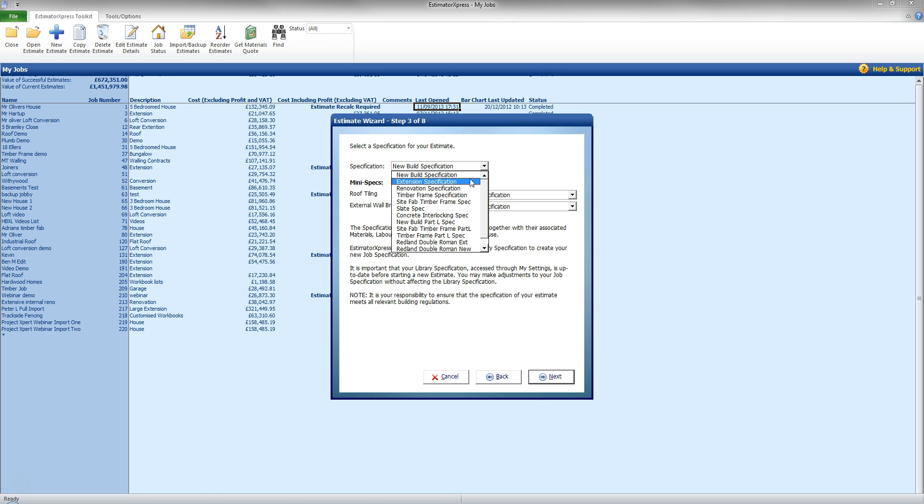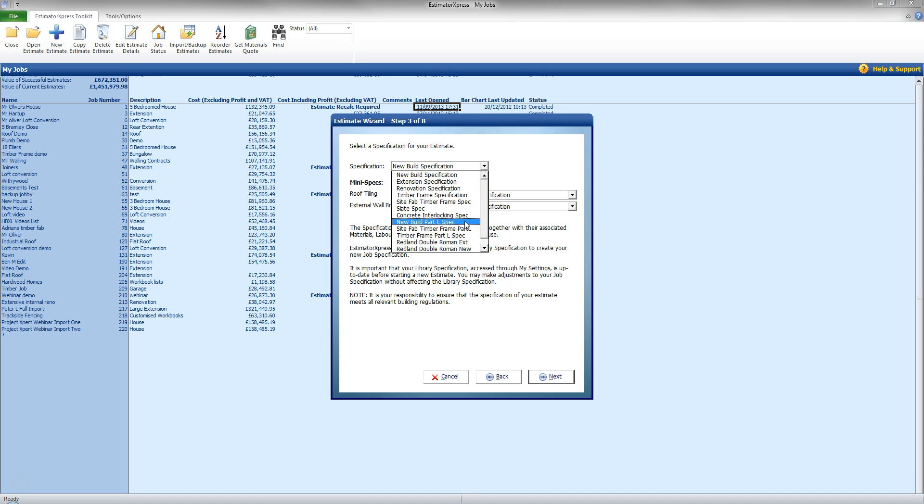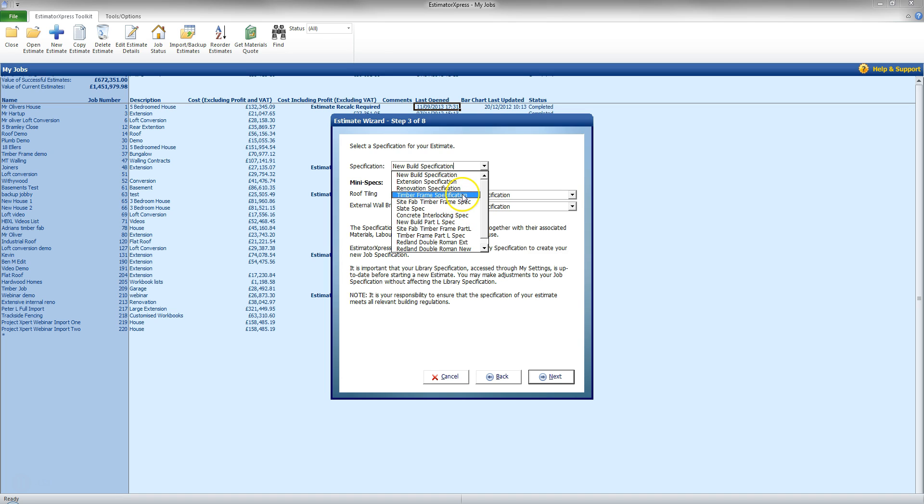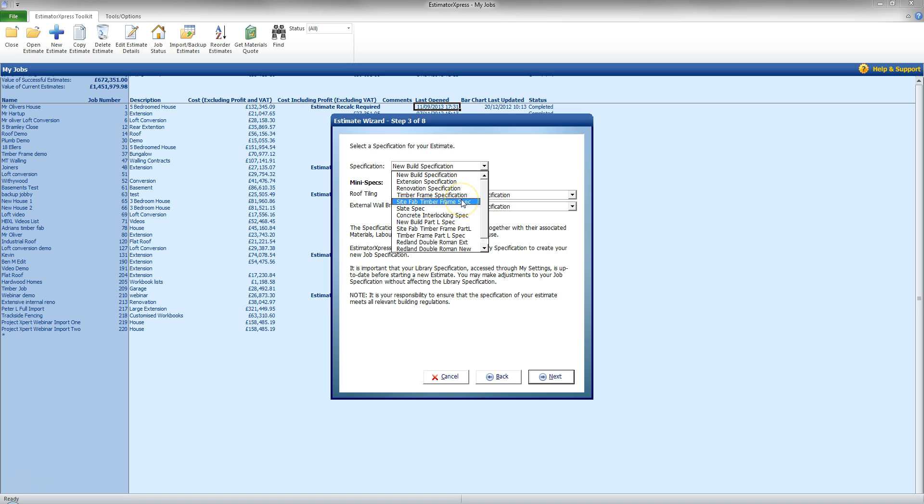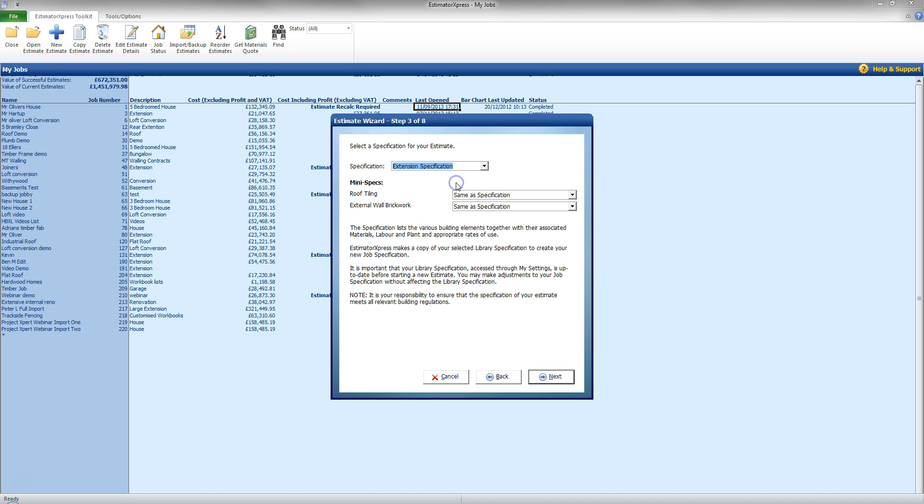If I was to go for a new build, such as the new build there or the new build part L updated specification, it will give me options for JCBs and tippers to remove the waste. In here we as well have options for renovation which extends the time for labour to do certain tasks as well as timber frame specs in there as well. Now I am going to go to an extension specification for this job.